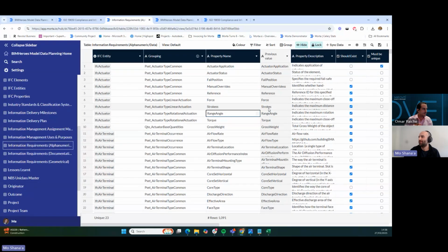So this is always logging the last value, and you don't need to do that manually anymore, which is also really relevant from a change management and revision control perspective, because right now what happens in projects is people are reliant on someone telling them that they made a change on a cell level, or they're asking them to fill in your old value and your new value.